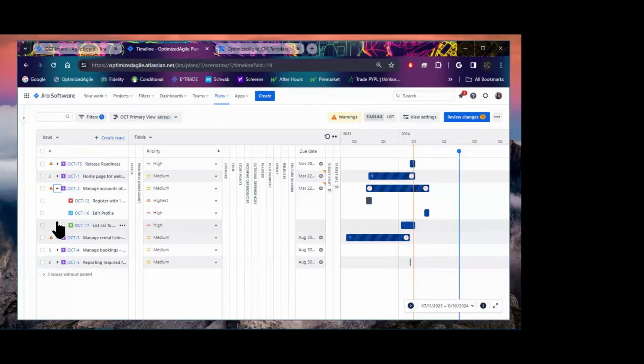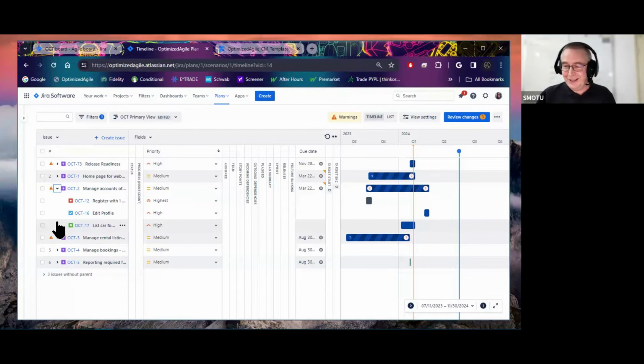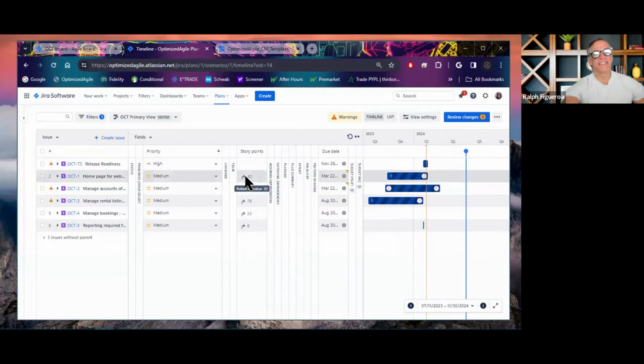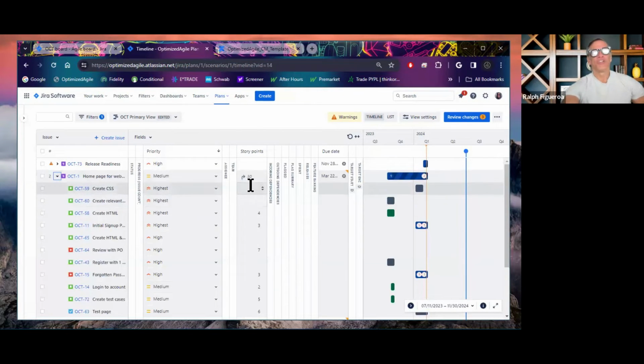Thank you. We actually had another question drop in earlier, just as we were thinking that we had no questions. I said I'd squeeze it in, and then we're going to close. Are the story points for an epic an automatic sum of all story points of the stories contained by the epic? The answer is yes. The sum that you see up here, that squiggly line, is a sum of the stories that have been story pointed, right? Because right now there are some stories here that have not been story pointed, and it will keep track of them.